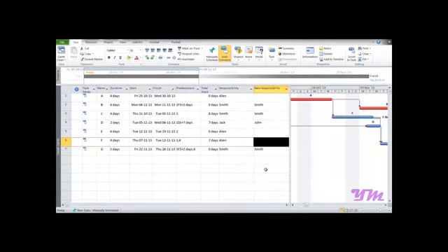Module 5, change working time. Suppose you want to make alternate Saturdays off, or you want to make Saturday and Sunday working altogether, or you want to add any other exceptions, that is a holiday or a vacation in between the calendar in Microsoft Project 2010, then we need to use the change work time function or change calendar function.